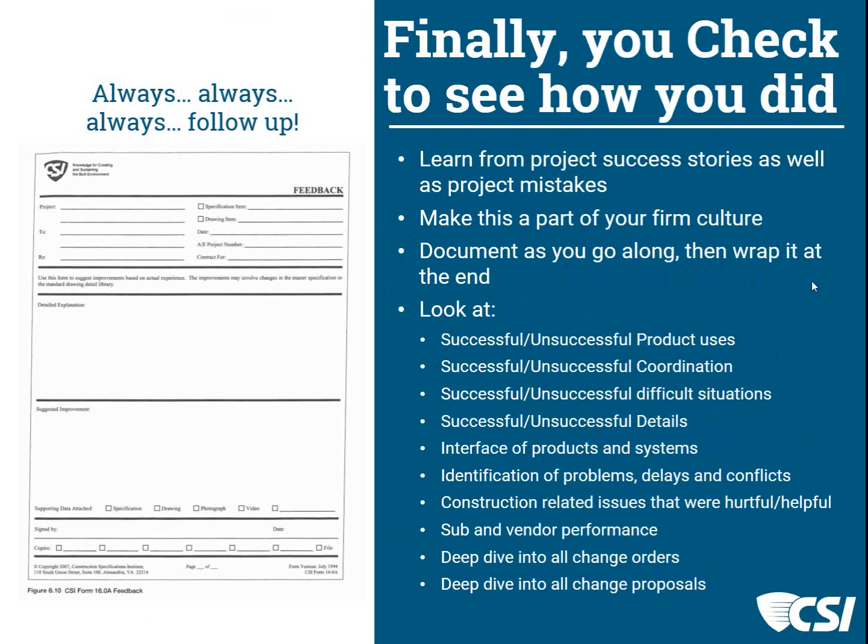Well, so specificity on a field report to me would be more an explanation of my observation. So let me say it a different way with an example. If this block work in this area represents movement in a direction that's non-conforming, I need to say, this is not in compliance. Let me be more specific about, in the specifications, what you can do out of plumb, out of level, mortar joint size. These are the requirements. This area is not acceptable, but I'm going to tell you what, it's in a closet, and I'm going to let this go, and I'm going to come back, and I'm going to look right over here to see how you've improved that. The owner I've already talked with, we've looked at it, it's okay. They'll accept it the way it is, but you've got to correct this.